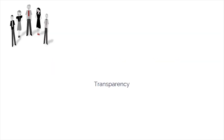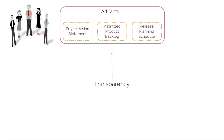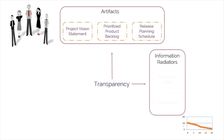In Scrum, transparency is provided by openly sharing the Project Vision Statement, which can be viewed by all stakeholders and the Scrum team. The Prioritized Product Backlog with user stories can be viewed by everyone both inside and outside the team. The Release Planning Schedule, which may be coordinated across multiple Scrum teams. And Information Radiators, such as the Scrum Board and Burndown Charts, which make a team's progress clearly visible to all.